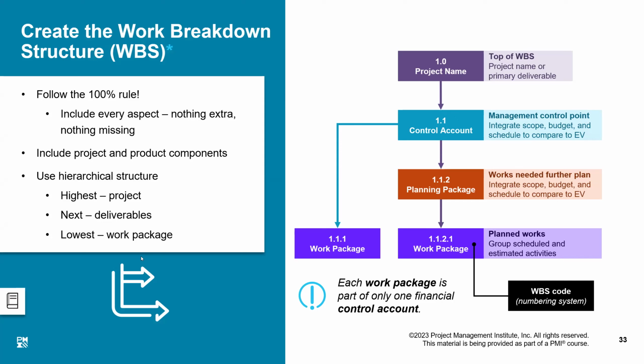Although when it comes to doing that job, that work package may have to be further broken down into activities, and that would be required when we are scheduling, doing the costing and all other things. But as far as the project manager is concerned, he is happy with work packages and doesn't want to go any deeper.